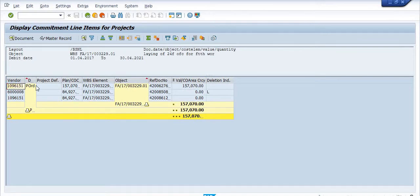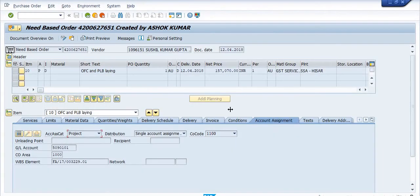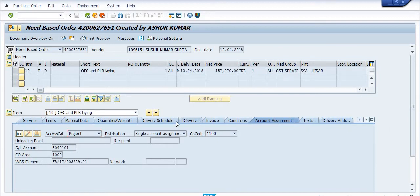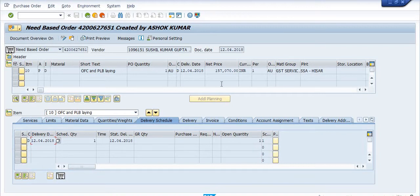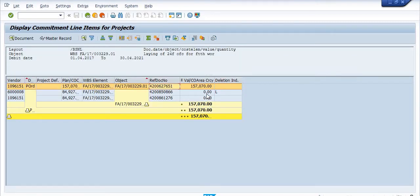After executing CJI5, we can see the vendor, the planned cost, the WBS element, and the purchase orders made with respect to this WBS. In one of these purchase orders, one quantity is still open in the delivery schedule — one quantity is open for 157,070. The PO is still open for one quantity. In the account assignment, GL account 5090101 has been used along with this WBS — that is why we are getting the error when closing. In the remaining two purchase orders, the open amount is showing zero.